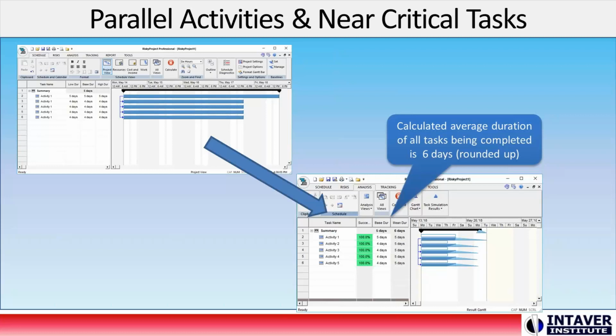In Monte Carlo, we have something we call criticalities: how often is an activity likely to land on the critical path. Rather than in critical path where there's only a single one, when we run a Monte Carlo simulation, we have the chance of multiple critical paths occurring, depending on each iteration and what sort of values are used during the run.